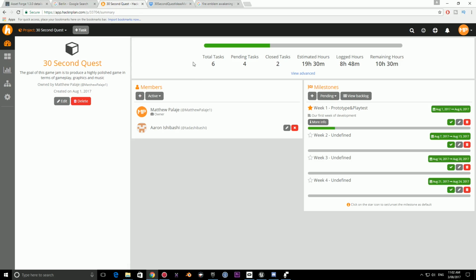I've covered Hack and Plan before in a video, but really briefly, what it allows me to do is have milestones and sprints set up here, and I can define the goal for each milestone, so week 1, prototype and playtest the game. We also have a progress bar as to how far along we've gotten in development, so we're 33% completed for this week. And if you have a look down here, I've got the various weeks set up and the various date ranges so we can see if we're on track or not.